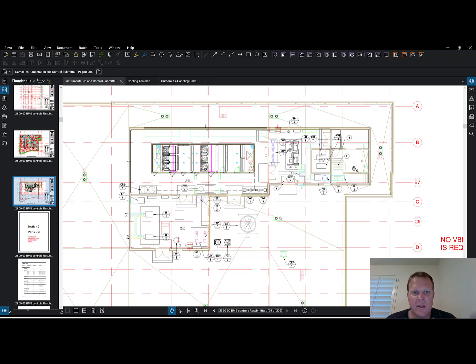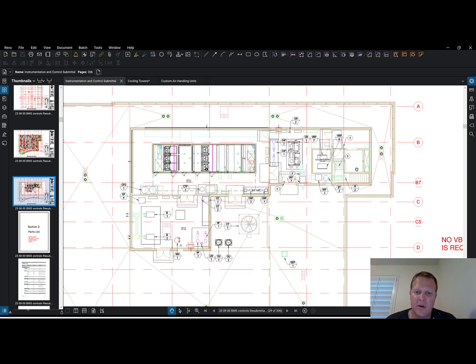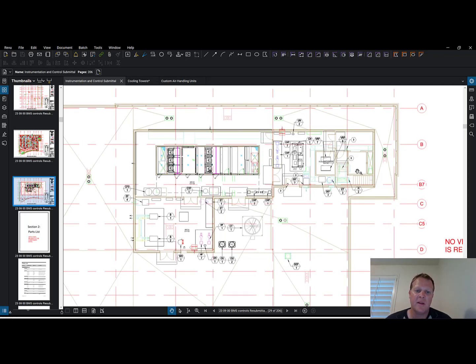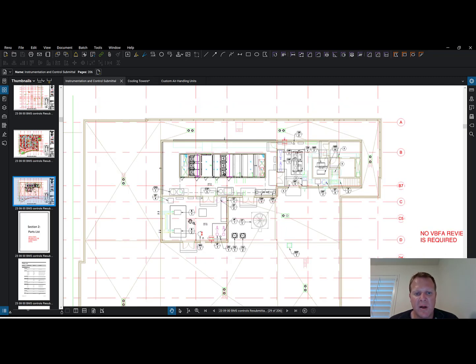virtual design and construction, VDC. So VDC or BIM, like the BIM model type work. And I believe this building actually got that. But there is a lot of coordination among piping, among how to locate the pumps, how to get all of it in. Anyway, this is a busy space. A great candidate, also, to spend some detailed planning on how to build this thing, how to do it logistically to get things up here. How are you going to get big boilers up on the roof?